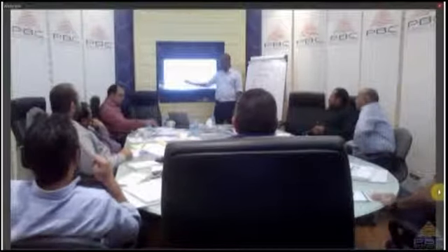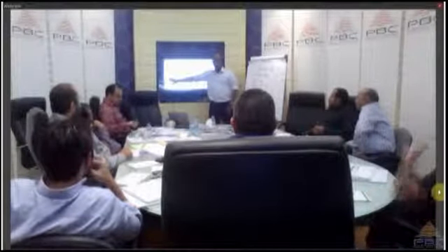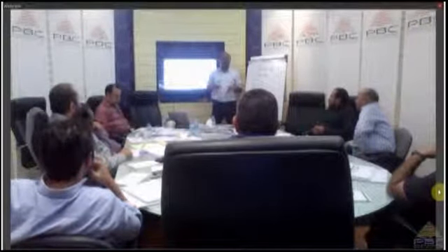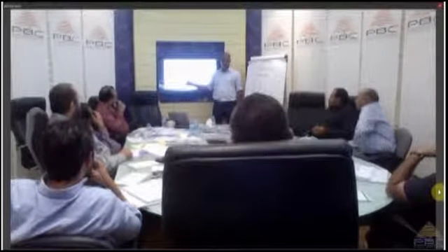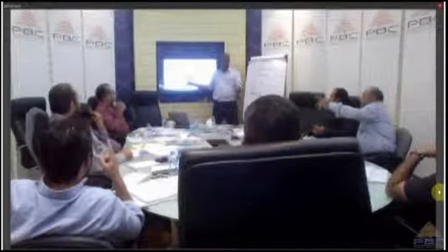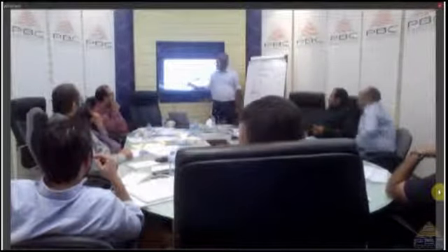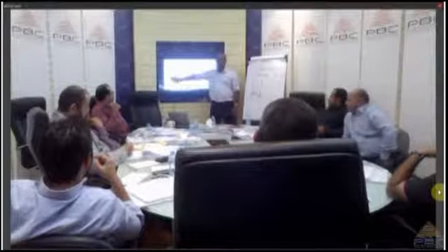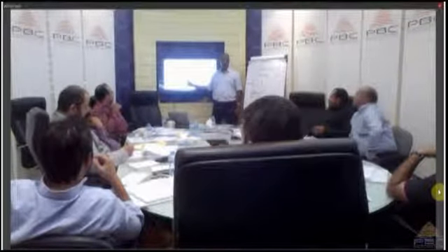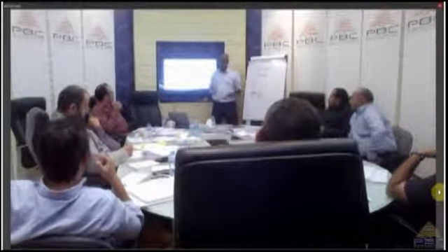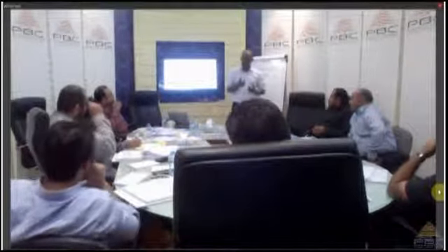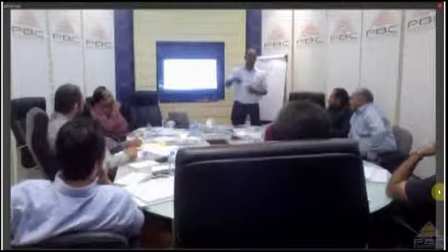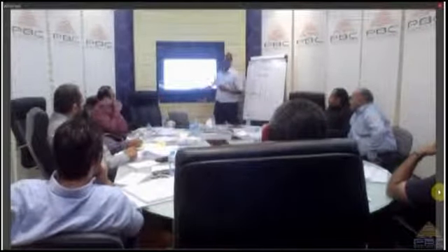So these people work with Wahib for the duration of the project. These 2 guys have how many bosses during the project? The functional manager and the project manager. Once the project is over, where do they go? They have a home. So we call this a matrix organization. It's very effective, but it's very challenging. The victims are who in this system?